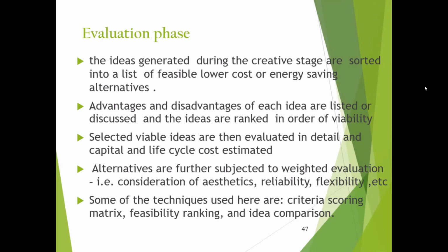Okay. Now we just consider some surface level evaluation. So consider the advantages and disadvantages. Professionals of different disciplines are going to give the advantages and disadvantages. They are collectively discussing, and based on these advantages and disadvantages, we do the evaluation and rank: what is the most feasible one, next feasible, and least feasible, like that.